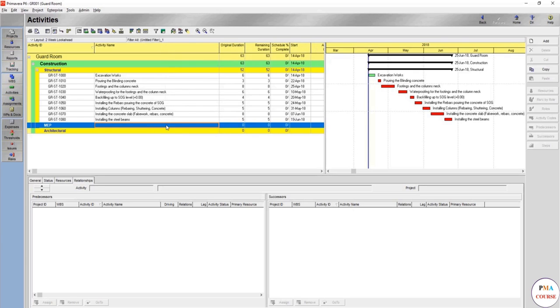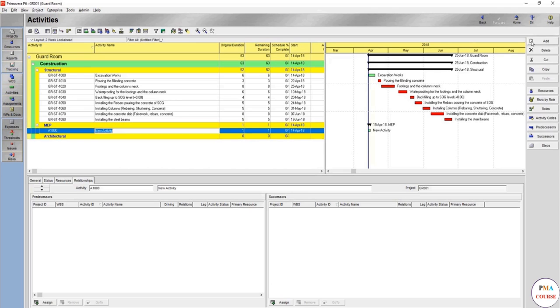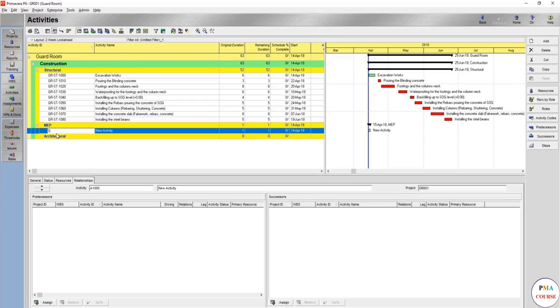In such case, what we're going to do is make it very high level, and this high level you might use later on as WBS. We might divide it into three activities, but in order to name the activities we will still use the GR, but instead of the structure we would use MEP then dash 1000, for example, or we can continue 1090.